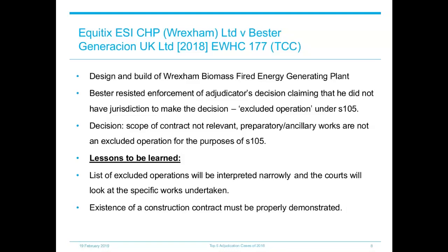In this case, it was held that the works undertaken in the project prior to termination were simply preparatory works, such as the preparation of business plans and bonds, which are often undertaken in major construction projects. These works therefore fall under Section 105(1)(e) of the 1996 Act, which says that operations which are preparatory to construction operations are covered under the overall definition of construction operations.